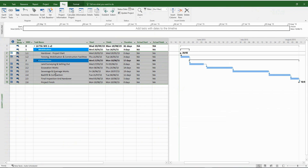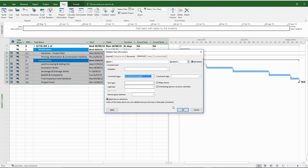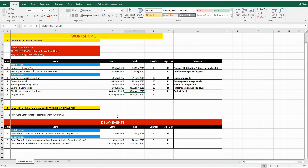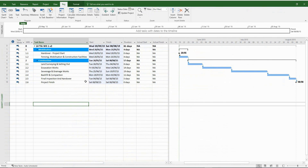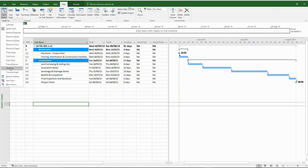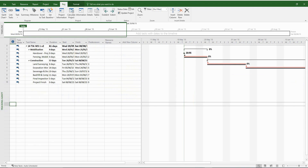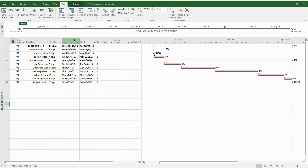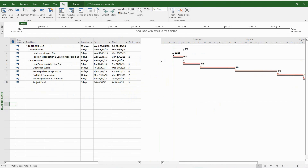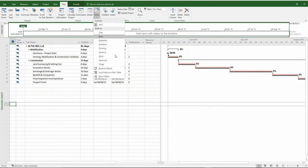Always remember to remove constraints — very important step. They can completely mess up your network logic. Change it to the default as soon as possible. And you can immediately see that the finish date has been reduced by two days — it's changed from the 10th of August to the 8th of August. Now it's time to save your first baseline program. Please go ahead and save your baseline and check it via the tracking Gantt view. The dark gray bars represent your first baseline. So everything is fine, and now you can move on to the next step.